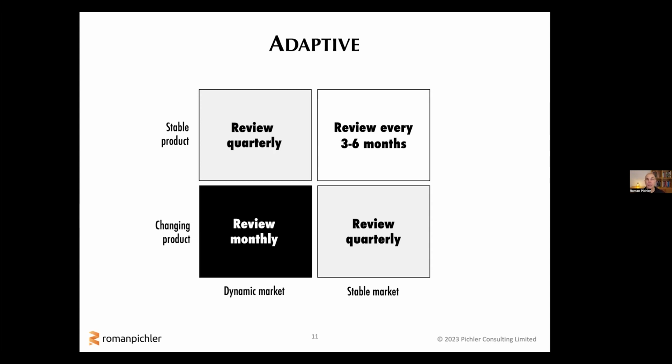Now that's great, and that works brilliantly if it's applied correctly on the detailed level, a tactical level. You could say a more output or delivery focused level. And now we need to do the same thing on a strategic level. We need to introduce and establish a strategy process or a strategizing process and have a regular inspect and adapt cadence on that level. And as I said, a good cadence tends to be, at least as a starting point, quarterly reviews. So don't forget to review your roadmap.